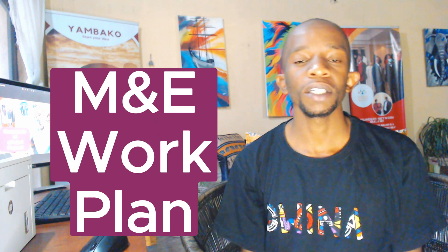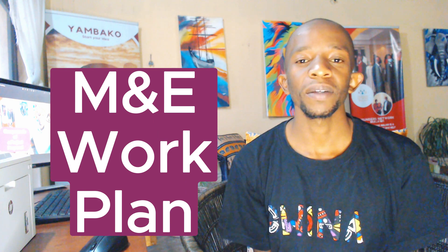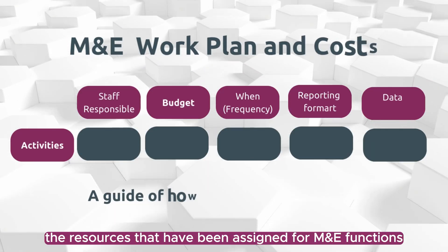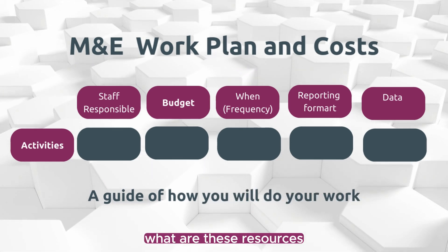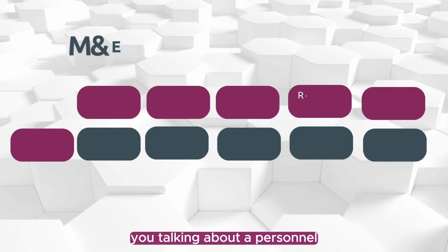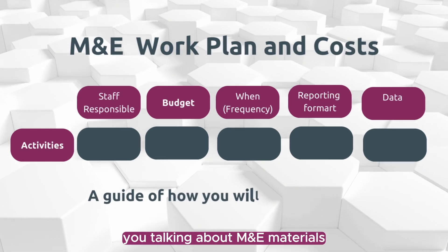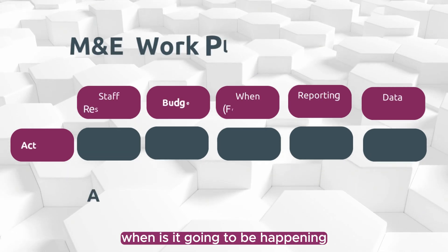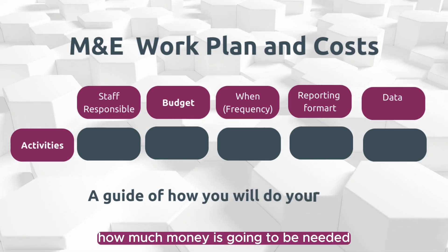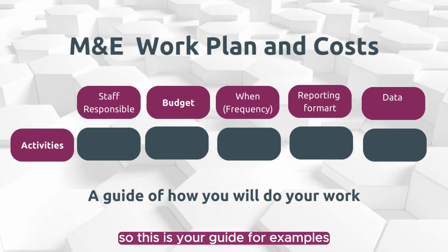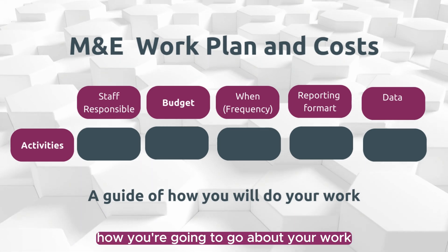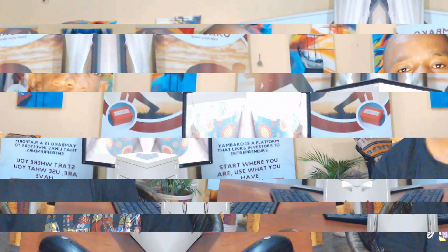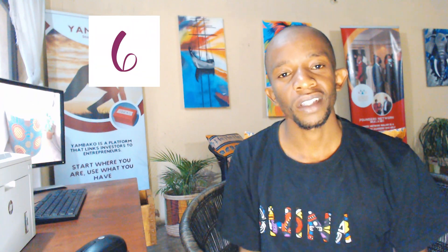The fifth important component is an M&E work plan. An M&E work plan is simply a document that outlines how the resources assigned for M&E functions are going to be utilized. These resources include personnel, materials, and finances — who is going to be responsible for what, when it is going to happen, and how much money is going to be needed. This is your guide as an M&E officer for how you go about your work on a day-to-day basis.